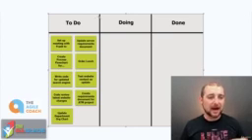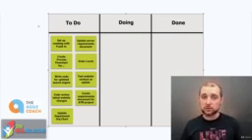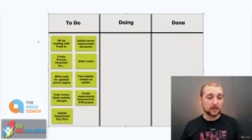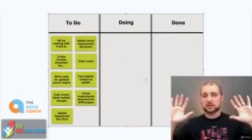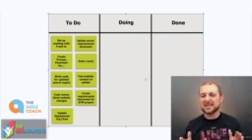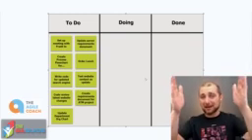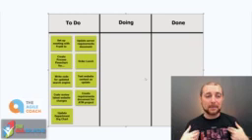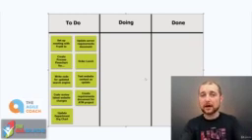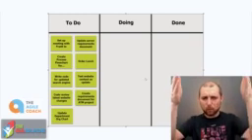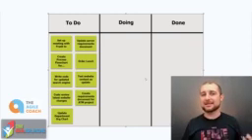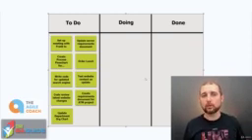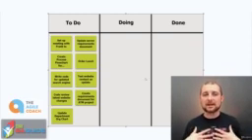So as we look here, the highest priority sticky notes or cards that we have in this case are setting up a meeting with Frank, updating some server requirements, and as we move on, creating a process flow chart, ordering lunch, etc. So usually it's top priority on down. And it's not always like a list, right? Because I may not be able to do a code review, which is one of the items on this list. So you don't want a 1 through 10 type of thing. You want a generalized priority, a general idea if this is a higher priority or a lower priority, so you know what to choose.